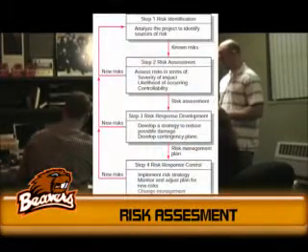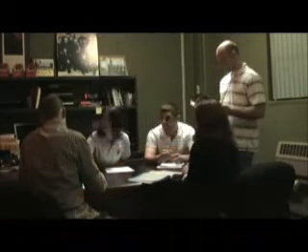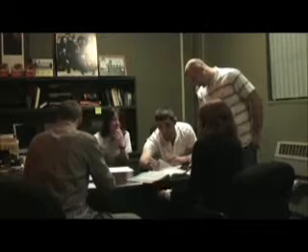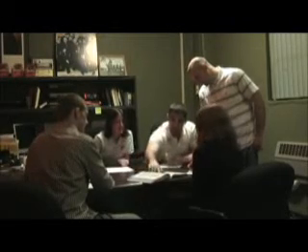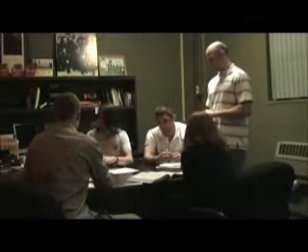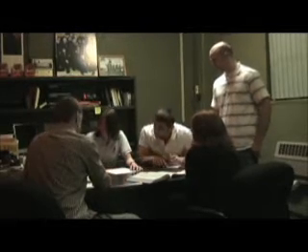During the second step of the risk management process, risk assessment, the risk relevance is determined. One of the most effective tools to achieve this is scenario analysis, which assesses each risk event in terms of both the likelihood it will happen and the impact it would have on the project if it did in fact occur. To help with this process, project managers often utilize a tool known as a risk matrix. Using a risk matrix will allow the team to analyze risk in terms of both the likelihood and impact and assign levels to each. Here, we see a simple 1 through 5 scale. While completing risk assessment, the team should start to realize which risk is the most threatening and begin to think about how to possibly counteract them.